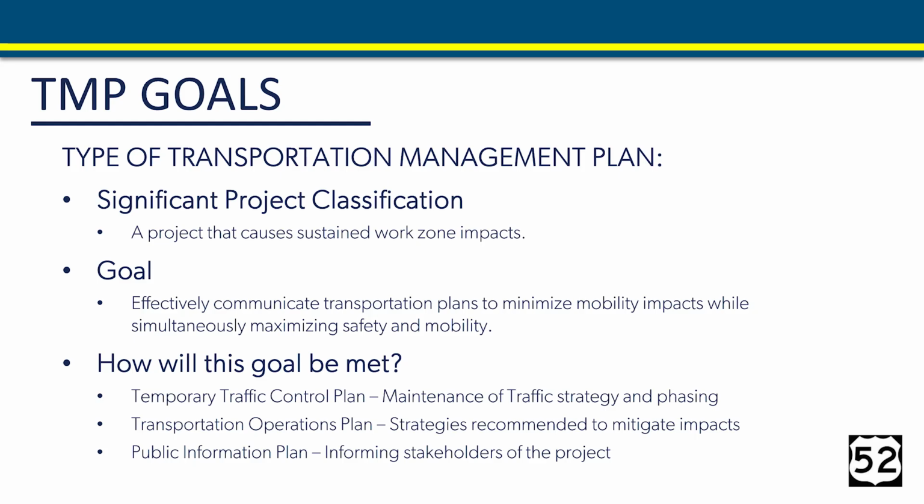And the third element is a public information plan. This is how we intend to communicate with stakeholders and the public during construction. Our plan will communicate closures, restrictions, and changes to the traffic configuration in advance of the set date using media, message signs, and INDOT Greenfield District contacts.